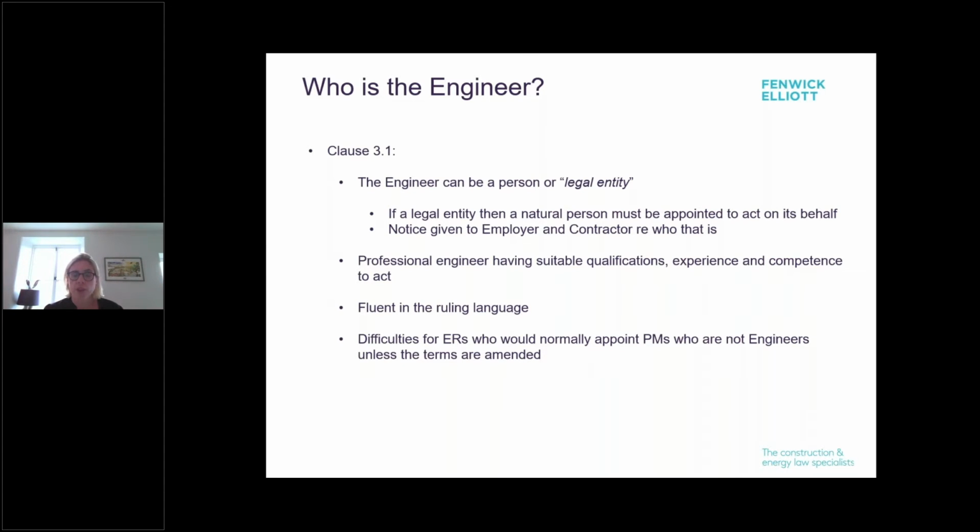They have to be a professional engineer having suitable qualifications, experience and competence to act in relation to that contract and fluent in the ruling language. Now, this can cause difficulties for employers who perhaps would normally appoint project managers who are not necessarily engineers, perhaps because they may potentially be cheaper, unless the terms are amended. So a failure to appoint somebody with the suitable qualifications as required by the contract could technically be a breach of contract. So you need to think carefully about who you appoint.